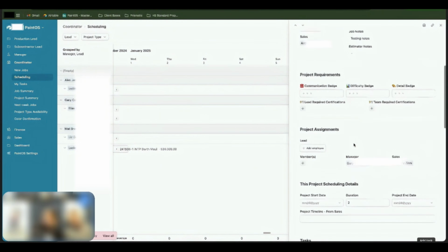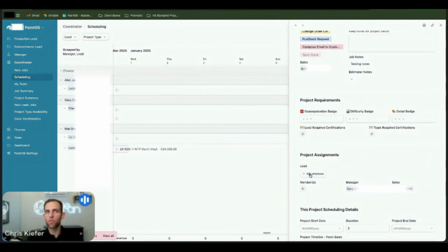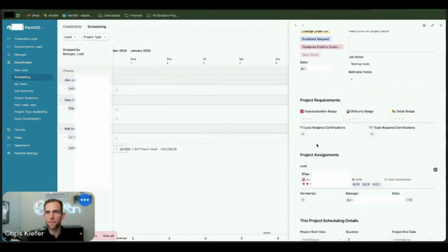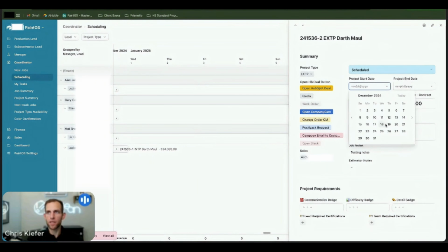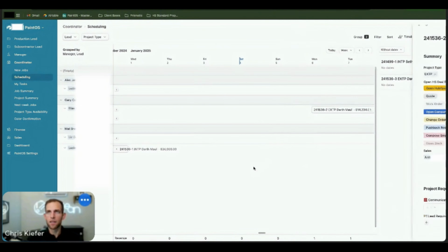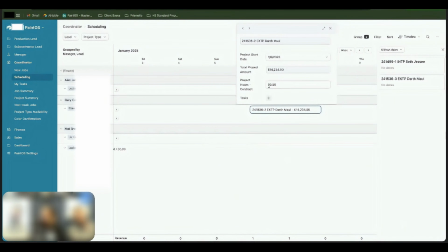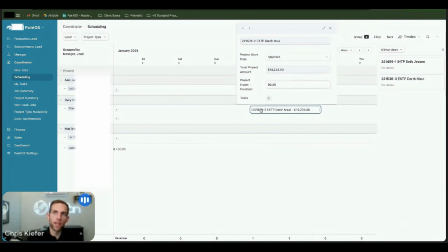So that's a right for Elias, by the day. When I dragged it onto Elias's, it gave it to Elias, if that makes sense. But if I had Elias on here first and then put the start date of January 6th, and what is Elias's capacity? It's 90 hours. Is that 45? Is that possible? 50 hours. Yeah. So then it puts it on the calendar for 2 days. Does that make sense? Yeah.